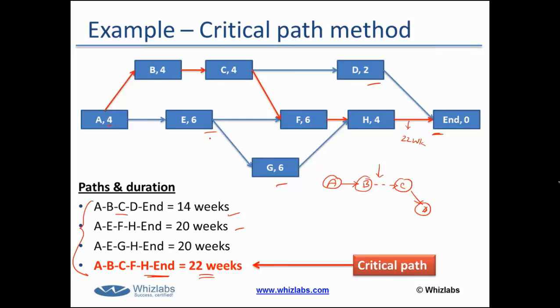And most importantly, why is it called critical? You have to monitor all the activities on the critical path very closely. If one activity is delayed by even a single day, the entire project would be delayed by that much duration.